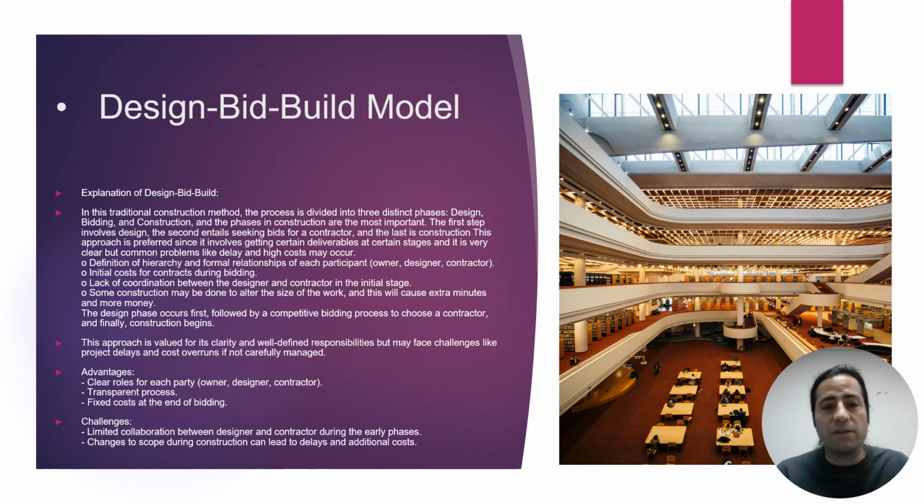The design phase occurs first, followed by the competitive bidding process to choose a contractor, and finally, construction begins. This approach is valued for the clarity and well-defined responsibility, but may face challenges like project delay and cost overruns if not carefully managed.